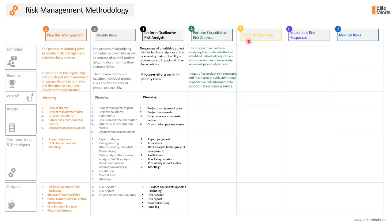The outcome of the quantitative analysis process will support the following step — plan risk responses. This process is also part of the planning phase. We will need the project management plan as an input, mainly the risk management plan showing how we will conduct quantitative risk analysis activities, in addition to the performance baselines. We will also need project documents like the assumption log, cost estimates, duration estimates, and definitely the risk register and risk report as key inputs, along with enterprise environmental factors and organizational process assets.